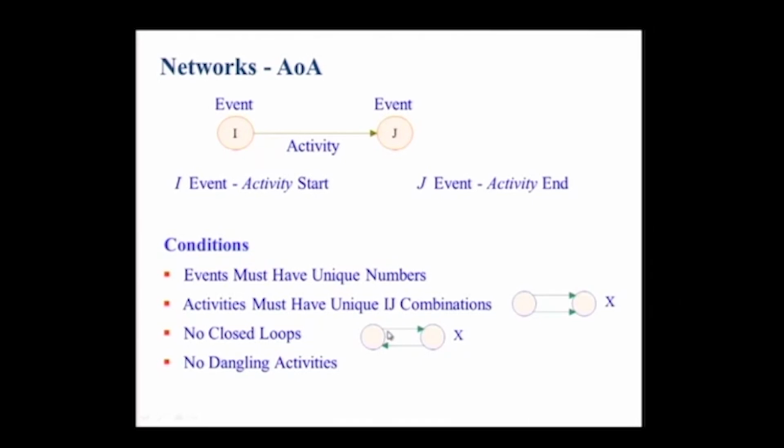Now if we take the inputs for a network, what I have shown you here is a set of activities and a set of predecessors. When you take activity A, it means that only after the project starts can we start. Once you start, only then does activity A start. To do activity D, activity B should finish. To do activity E, activity A should finish. So this is called the relationship. For example, to start activity I, activity F and G should finish.